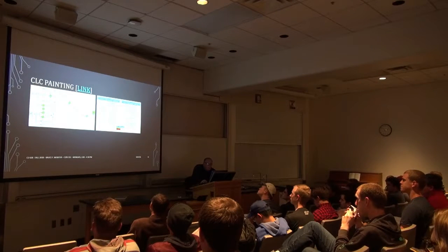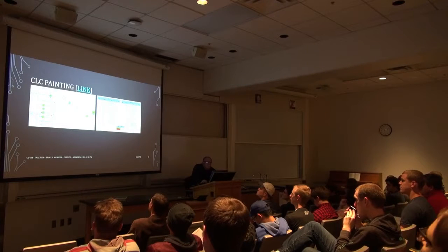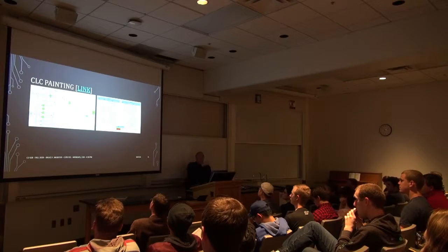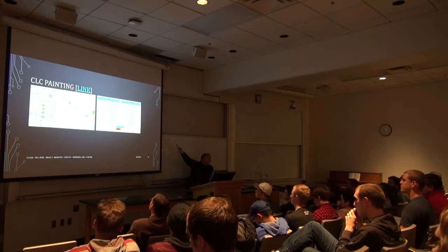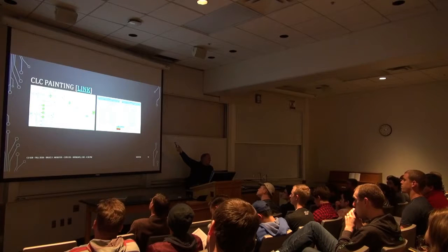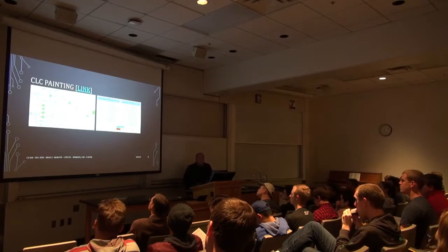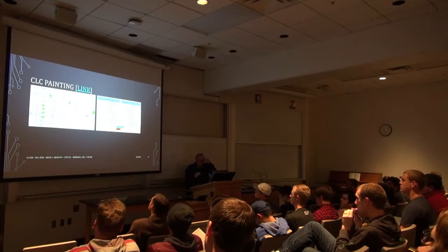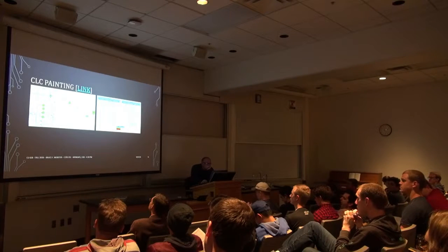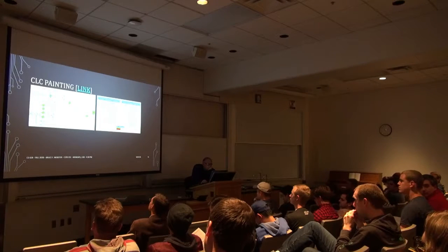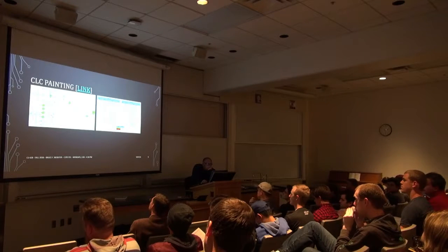Who wants to talk about this? By the way, this demonstrates a common technique, which I'm not sure any of the other ones did. We talked about it last week: you have some sort of ID within the node, and then you've got a task list on the side where you've got more details. So one of the main things about ours is that we have two main groups working. Up to the first prototype, they're going to be pretty independent, and then we're going to be connecting them right at the first prototype.